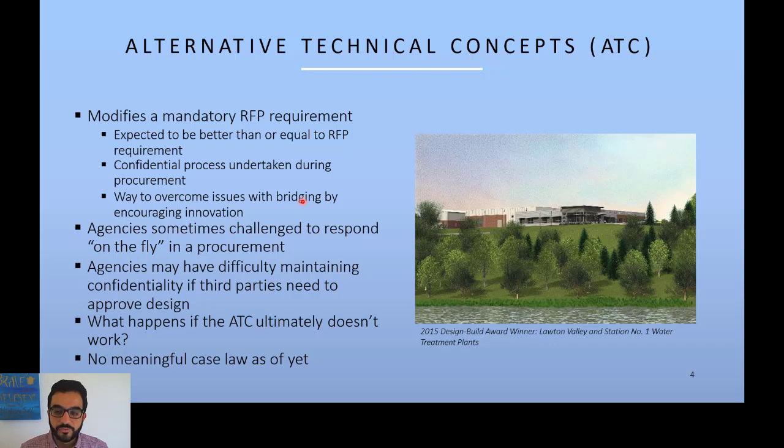Sometimes it's difficult to maintain the confidentiality of an ATC if a third party needs to approve the design, such as permits. In the permitting process, the documents are publicly accessible, so that's an issue here. Also, there is the on-the-fly response from the agencies. They need to provide immediate response on the ATC because this response will be needed to submit the final proposal, so they need to provide early feedback on the ATCs.